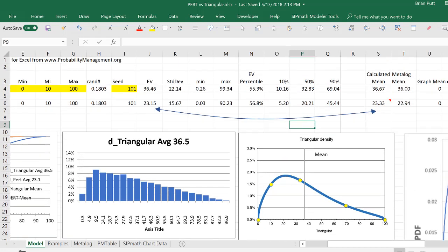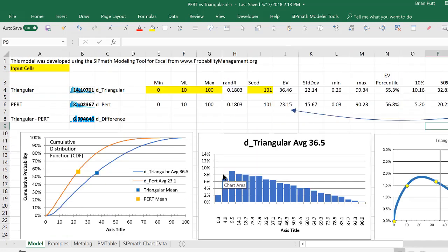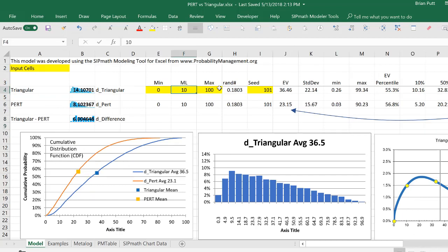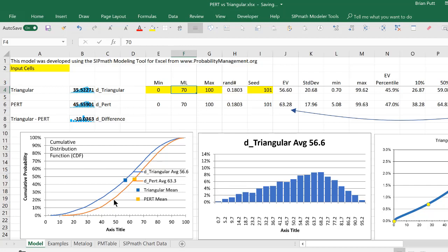So if on the other hand, now look at these lines. I'm going to change this 10 to a 70. And when I do that, the curves change, everything's updated automatically with the SIPMATH model. And we find that the PERT diagram now has a higher expected value than the triangular.